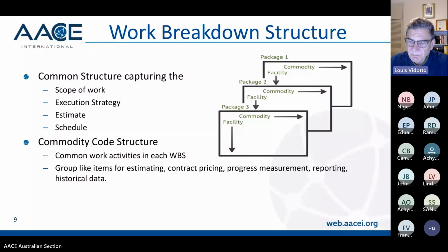One of the benefits of having a well-structured work breakdown structure and a reporting process is that when you come to do an historical report, you can actually match up where you started from, how you've gone through the project, and then where you've ended up at the end. So historical data then becomes extremely important to feed back into your estimating process. So you've estimated a project, whatever it is.